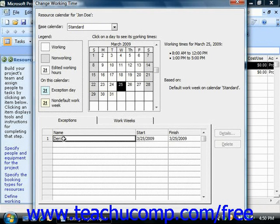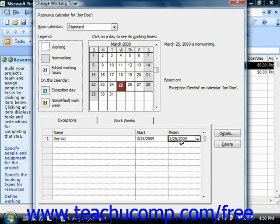If this is incorrect, click into either or both the Start and Finish columns to indicate the correct start and end dates of the time off from the project. You can then repeat this process as needed in order to enter any other time off for the selected work resource.